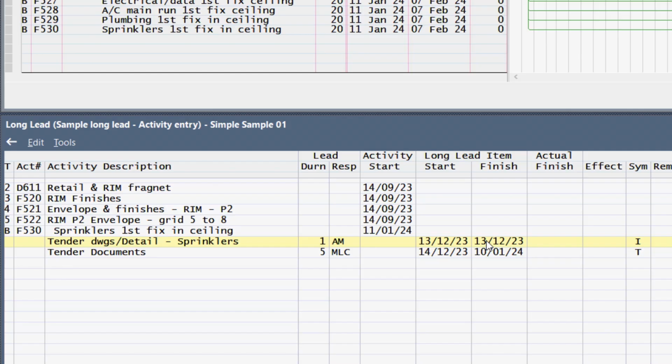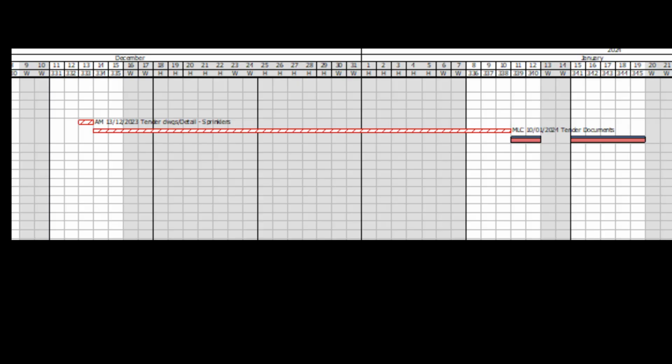We can also show this on a portion of the report so that it makes more sense. On screen you now see the section of the report indicating that the tender documents period spans 3 days in January, but when it starts, 2 days in December, clearly showing that the 5 workdays are used and not the calendar days, so the December holiday is also taken into account.